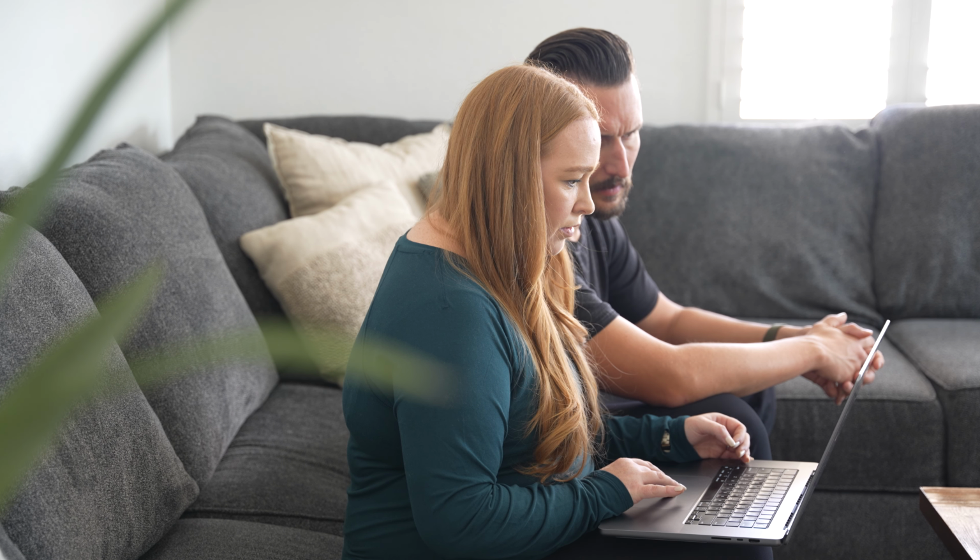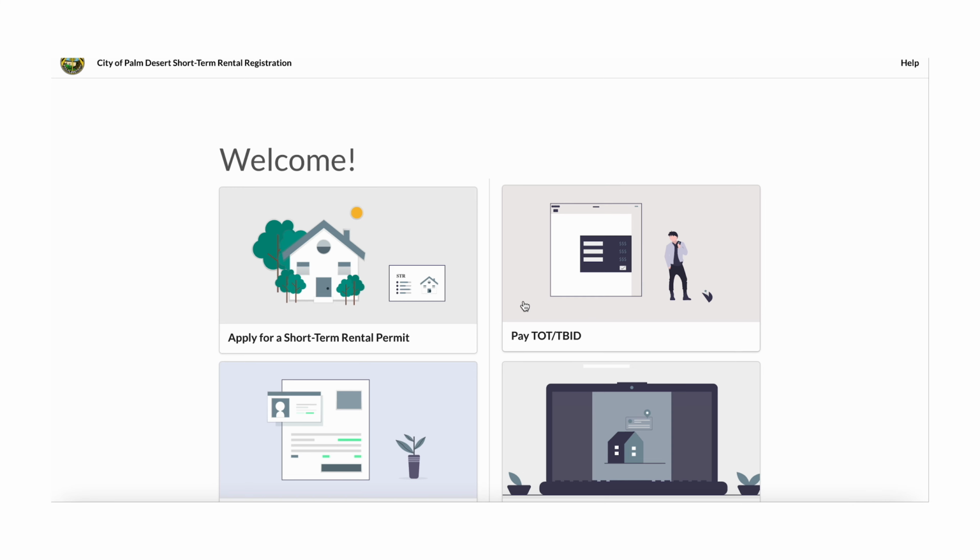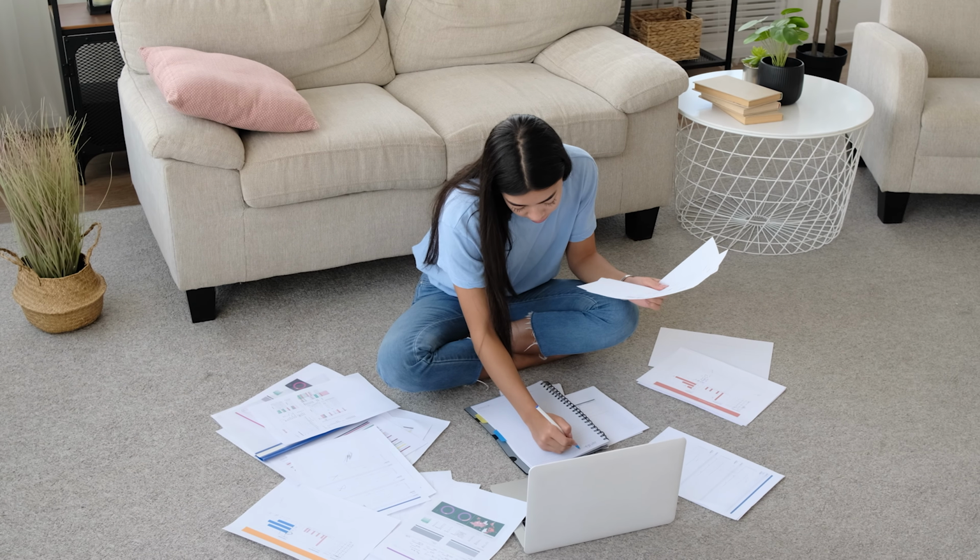Clients are coming to us for our guidance and expertise, and we've become experts on what it takes in all the local cities in our area for permitting. And this permitting process can affect the timeline of the whole project, so it is important to know these things. For example, in the city of Palm Springs, it can take weeks, if not months, to get your permit. This involves inspections and a lot of paperwork, so getting this process started as early as possible is the way to go.